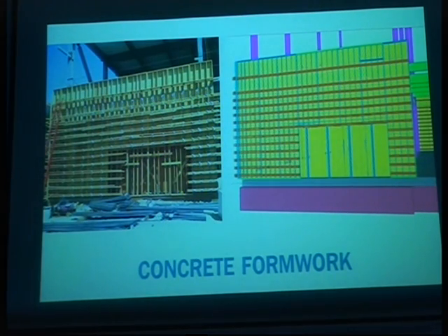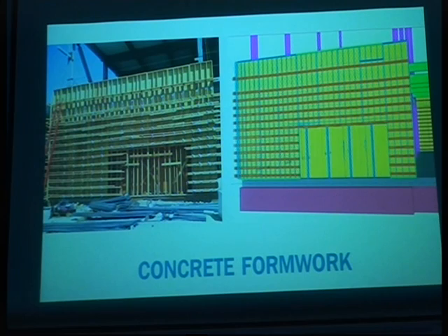Like I said, we self-perform concrete, so concrete is a big part of our business, and sometimes we get into a lot of complicated formwork or shutters. And so we model, so these are prefabricated, even though it's wood. It's prefabricated, so we model it first, we send it to the shop, and then we're able to prefabricate the formwork.